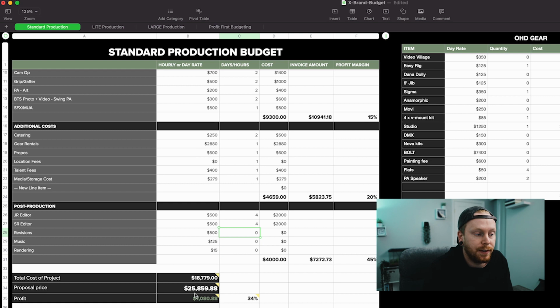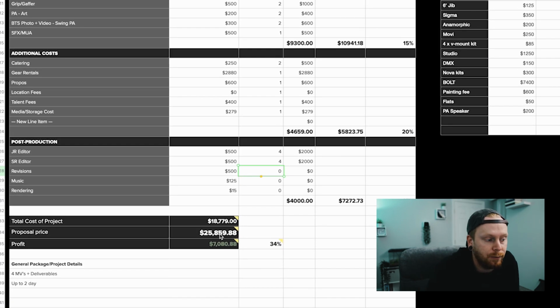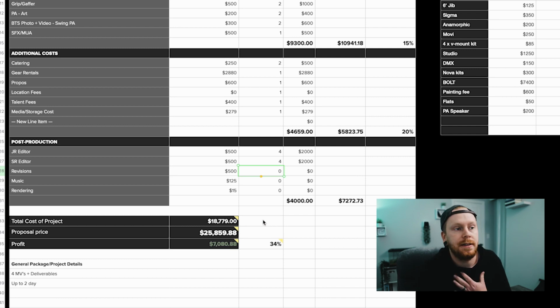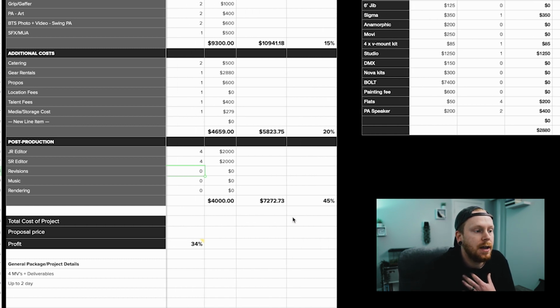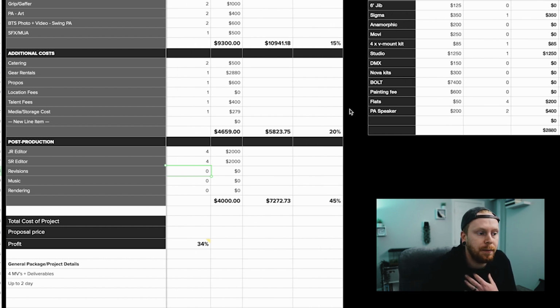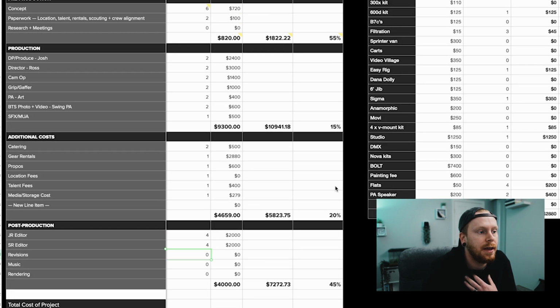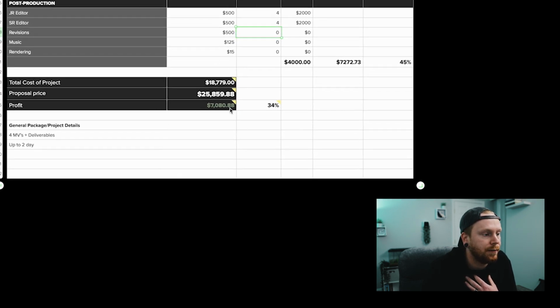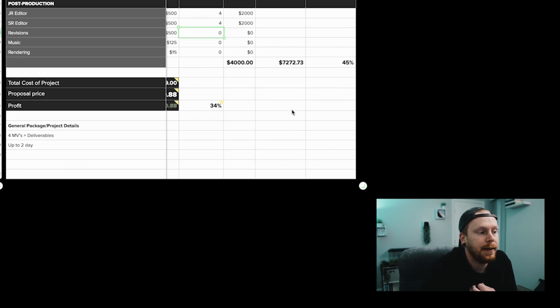This you can see is at the highest level for 4 music videos. We have 25,000. It's going to cost us $8,779. I'm going to dig in a little bit more on this. So if you look, you have the 15%, the 20%, 45%. These are the profit margins. And if you look down here, it adds up to 34% profit margin. That's where we like to land.